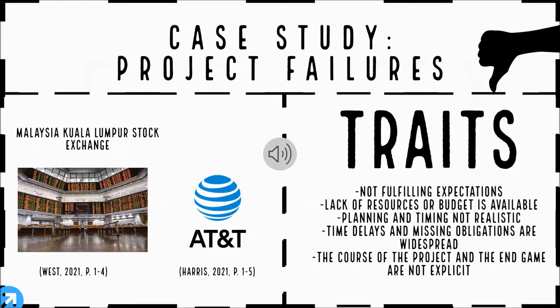In this case study, a project in Malaysia — the Kuala Lumpur stock exchange — some of the failure traits were related to not following key concepts. These included not reaching expectations, a lack of resources or budget, planning and timing that was not realistic, time delays and missed obligations being widespread, and the course and end goal of the project not being explicit.